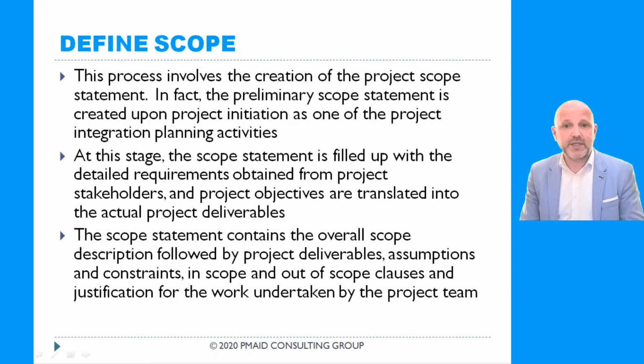The scope statement contains the overall scope description, followed by the project deliverables, assumptions, and constraints, in scope and out of scope clauses, and justification for the work undertaken by the project team.